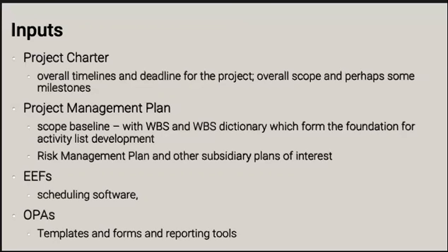The project management plan, rather, provides inputs like scope baseline together with the work breakdown structure and work breakdown structure dictionary. Those 2 documents provide a list of deliverables which are required to create a list of activities, and those activities are going to be sequenced to develop a meaningful schedule.